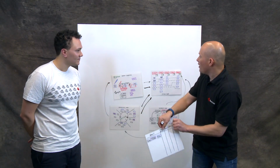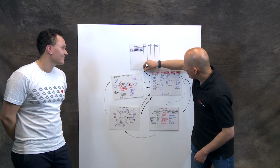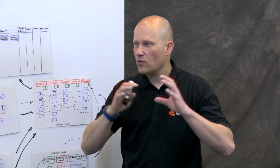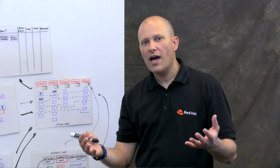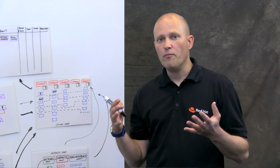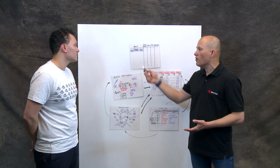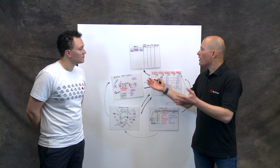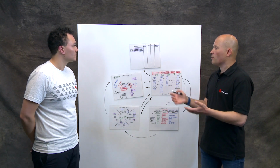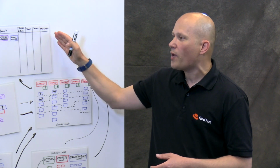And the beauty of this is then you can create a roadmap for flow. You would take all those ideas of how might we explorations, and you would capture them, structure them in terms of goals. What kind of iterations we can have in order to create capabilities for our customers. What kind of capability you want to create, that will be the goal. And you identify the experiments and the research that you need to carry out to understand what could be the thing that we need to build, which will be the epics and the stories. And they will flow. You will follow them all the way to the end.